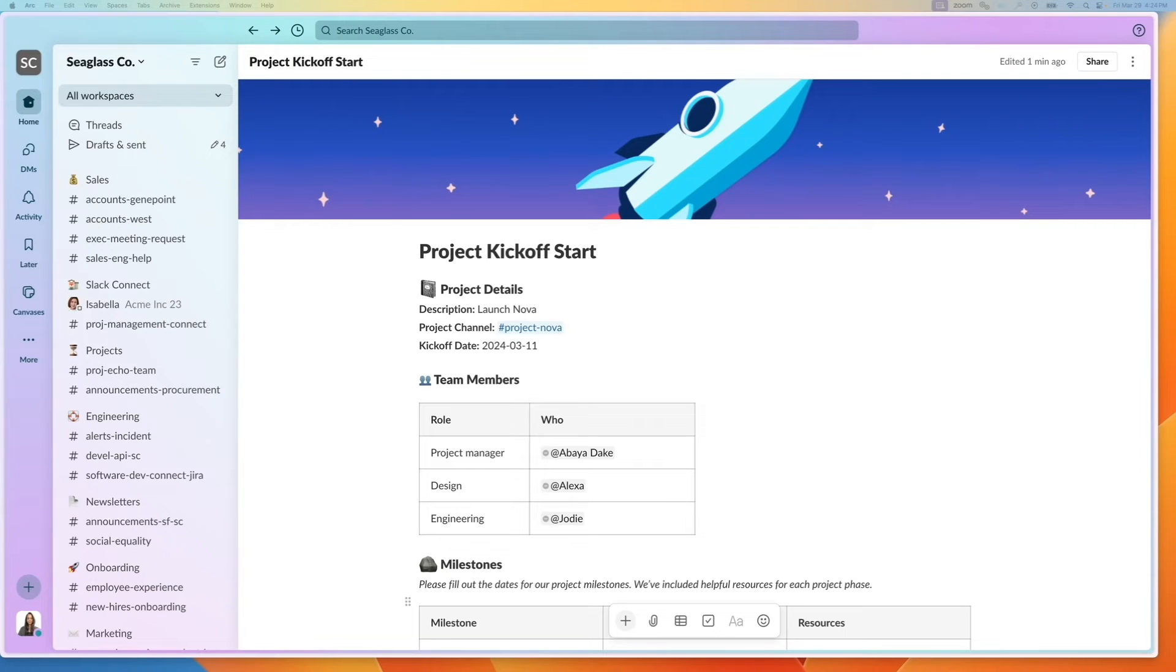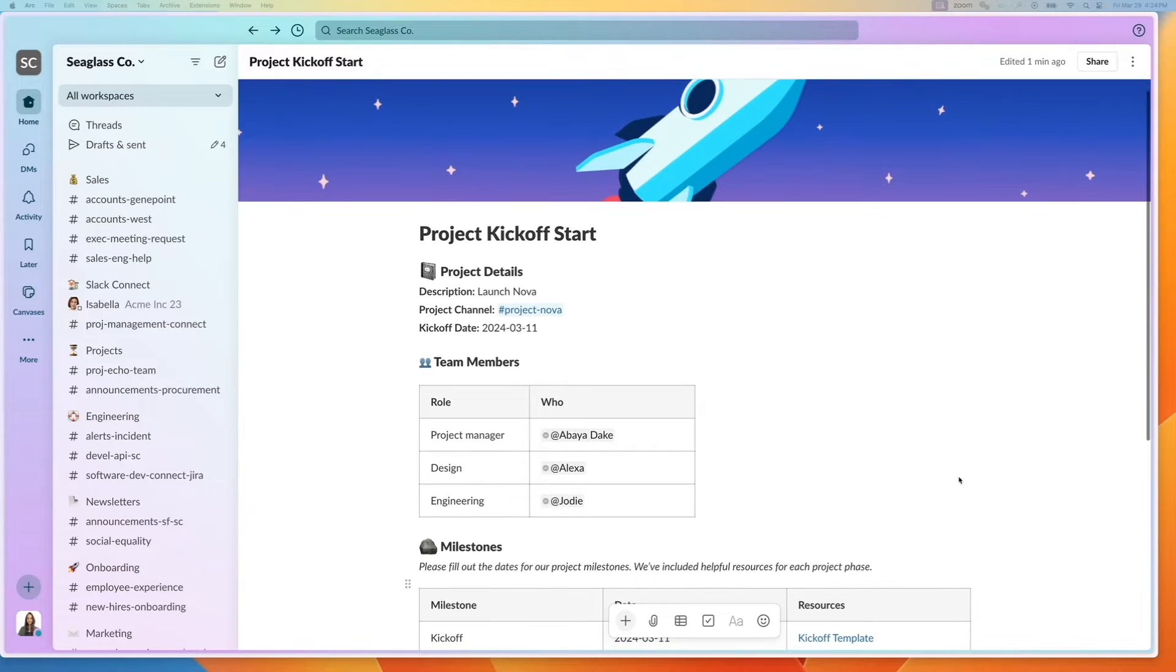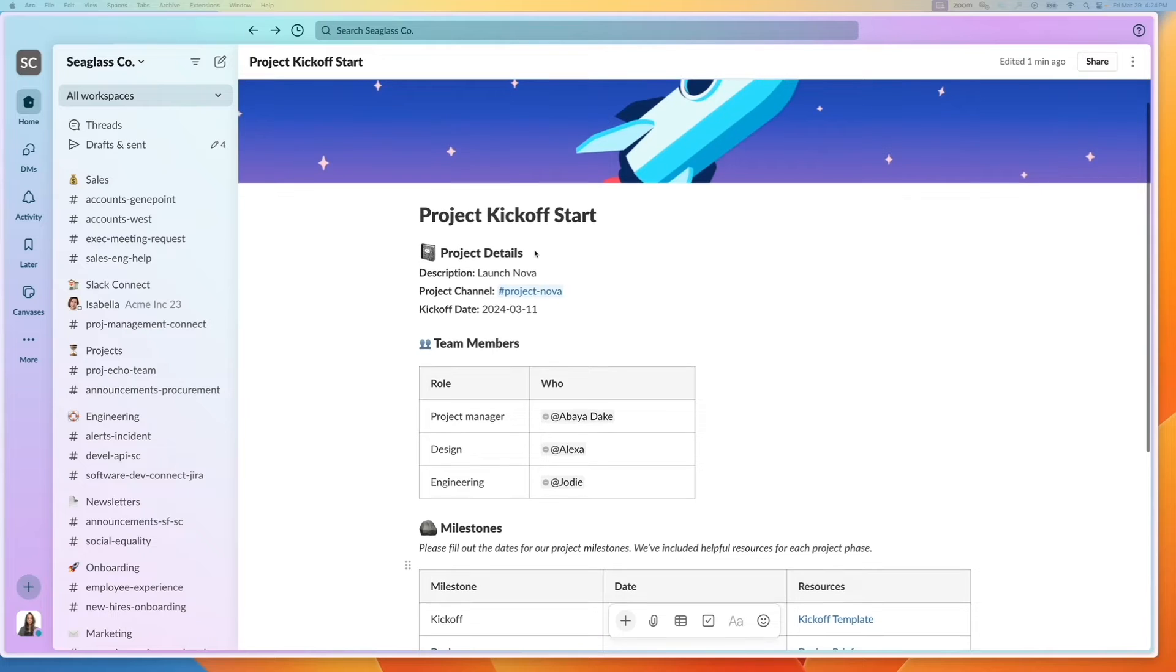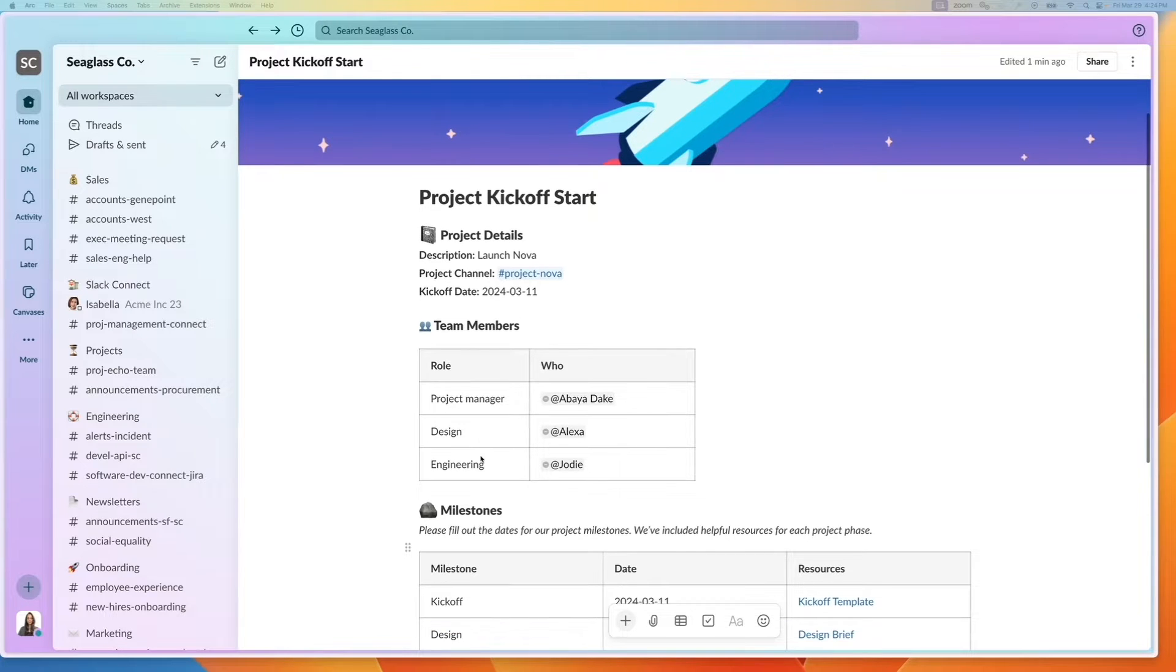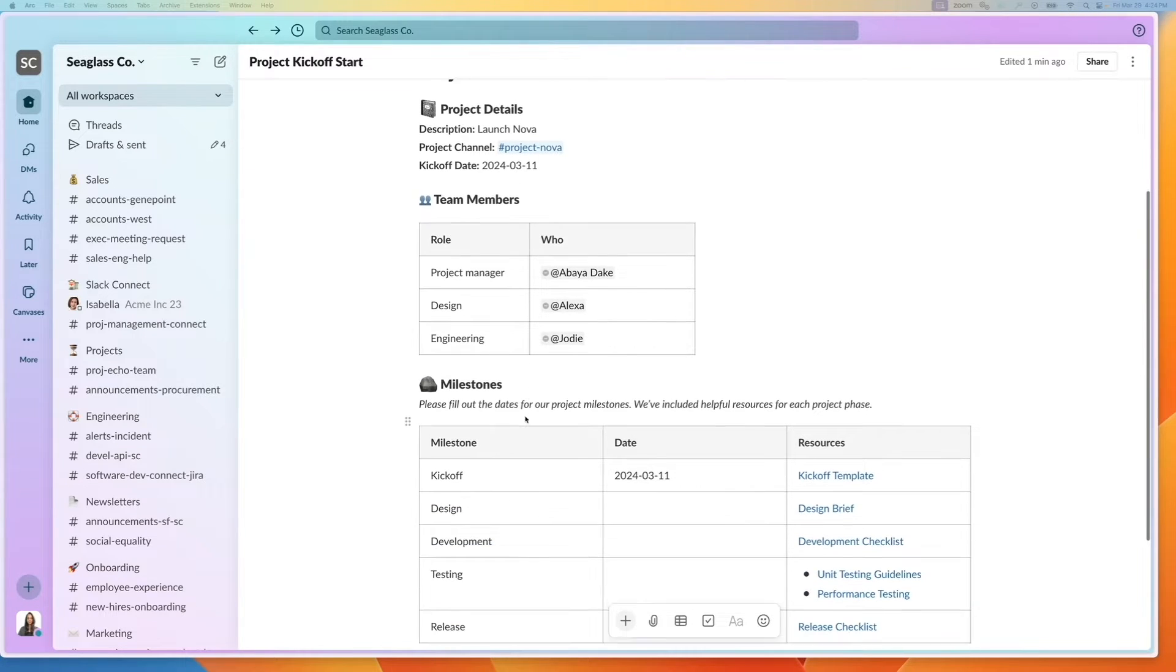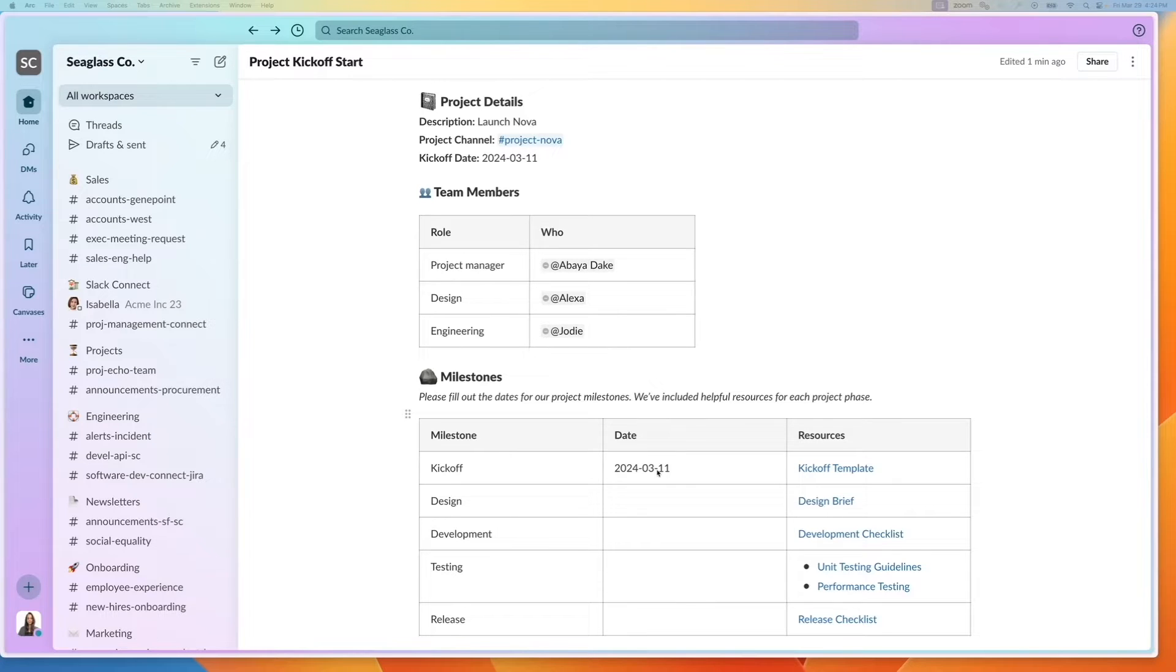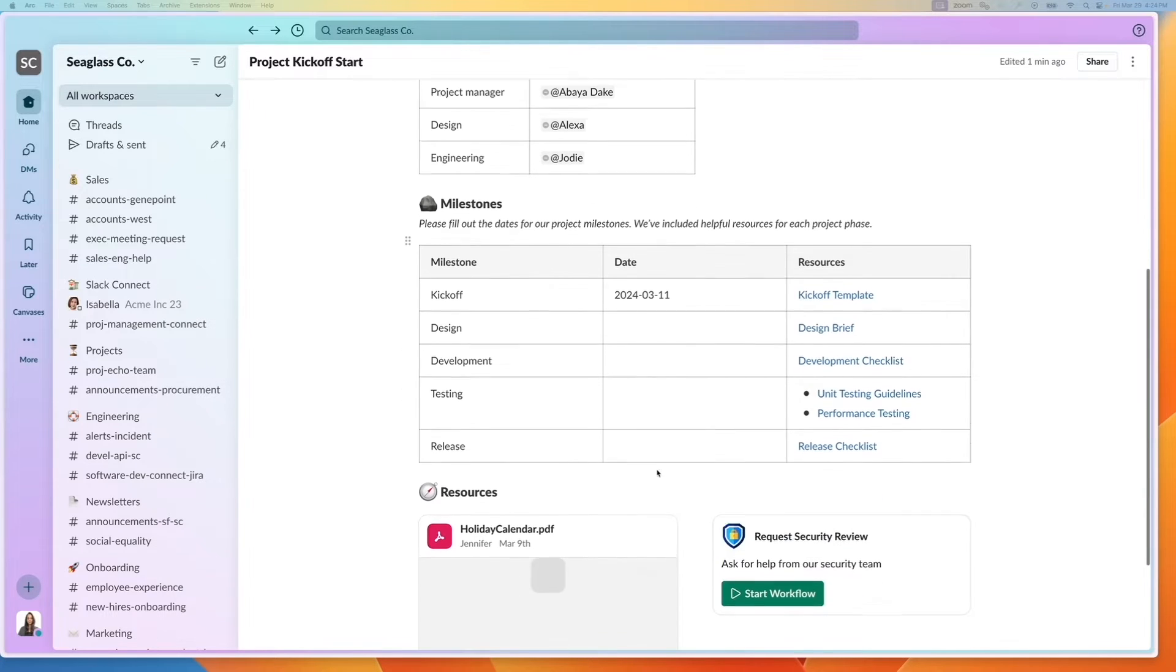I have a project kickoff canvas that I define for every single project I've launched. It includes descriptions, project channels, different team members, and at least the starting milestone kickoff date, and I can fill out the rest later.